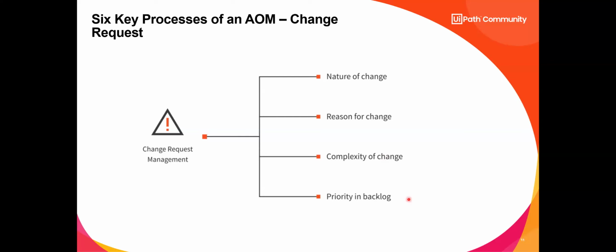and then you can see what's its priority and backlog. So changes to automations that are already deployed are new automations or modifications to an automation that are put into backlog. And then you prioritize those like you did during the intake part. So change management is a different monster here than it was when you were building, because you've already built it and deployed it. Now the change management takes on a new look.